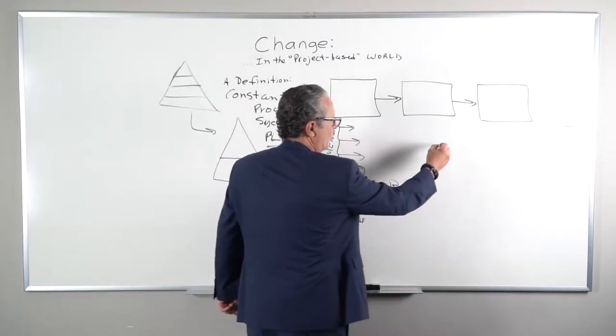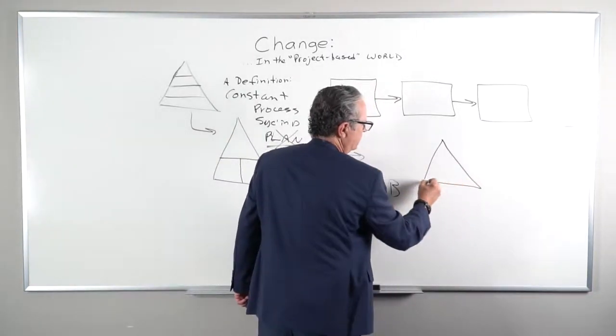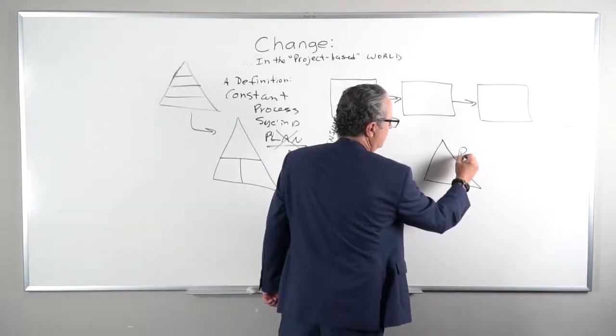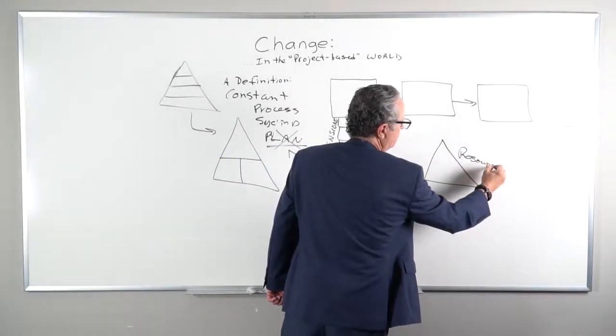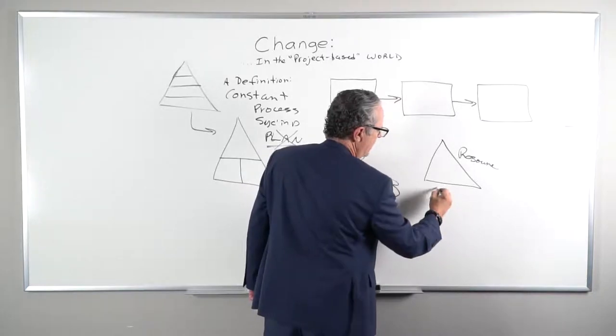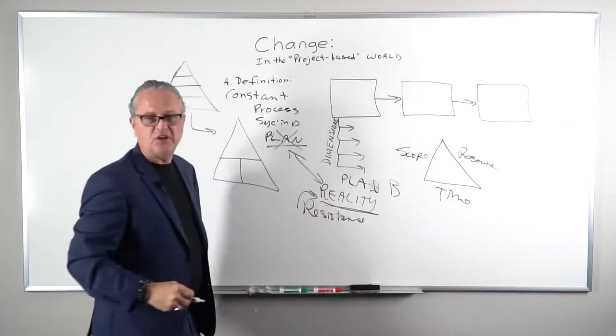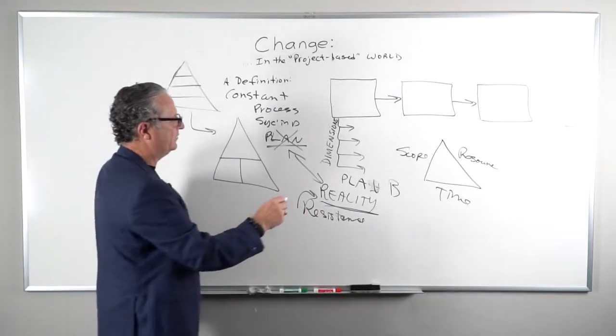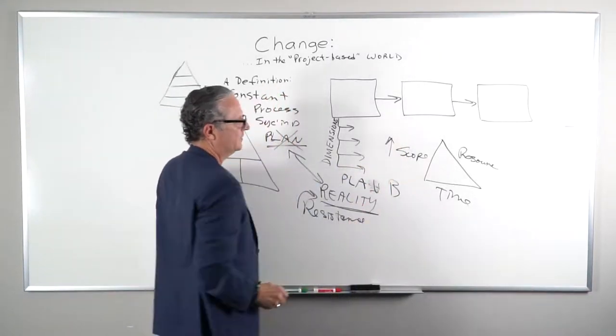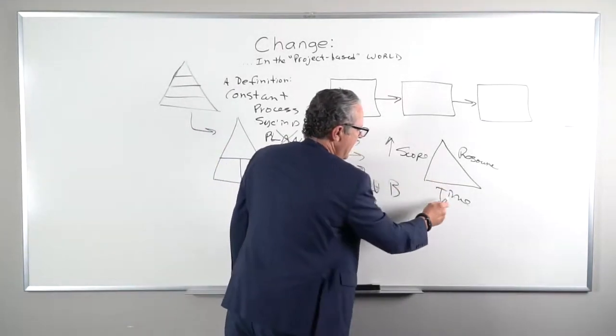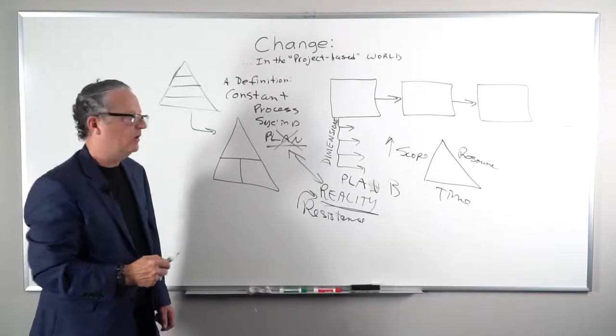Well, we know this thing called the triple constraint model. It says there's resource, there's time, and there's scope. So what are we going to change? The scope has increased. What do we got to do? Add resource and or add time or reduce scope.